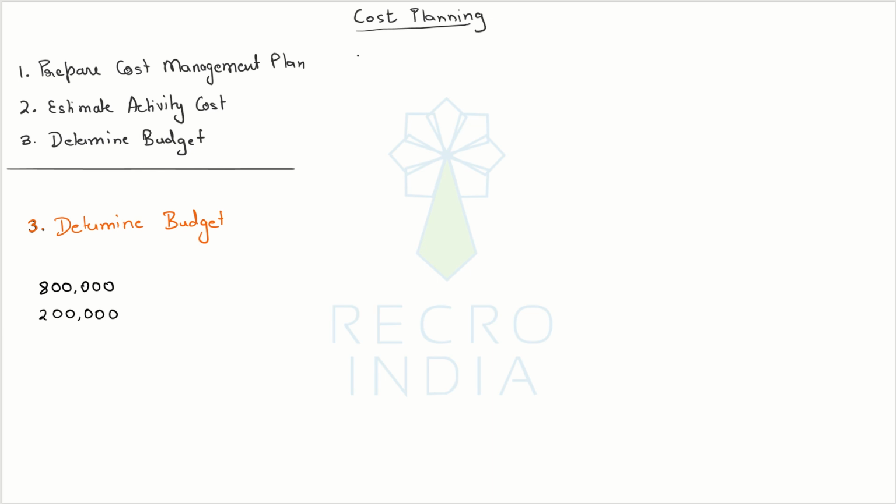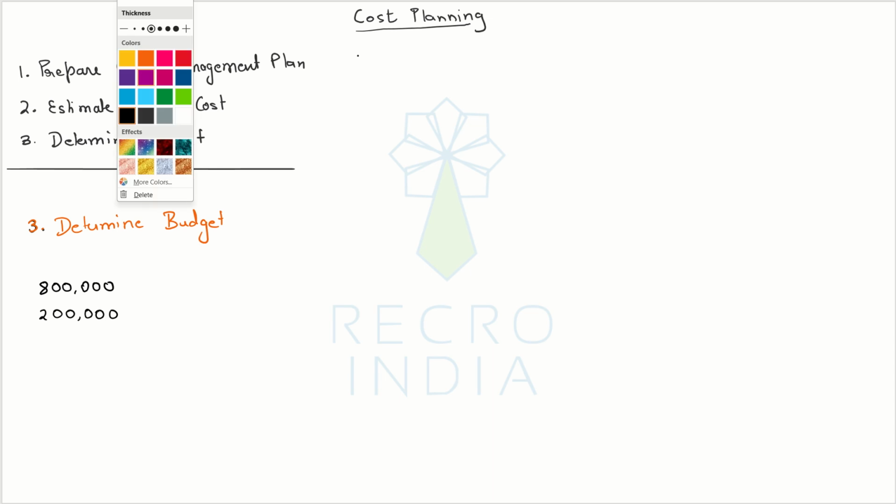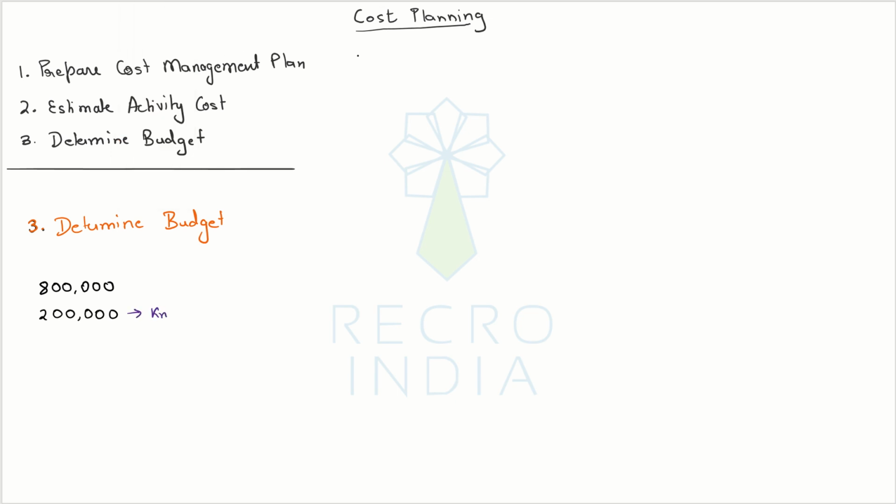This is not just taken as a percentage, but there is a proper calculation that would have happened as part of your risk planning. So this is the amount of money which we are keeping aside for known risks, and we like to call this our contingency reserve.